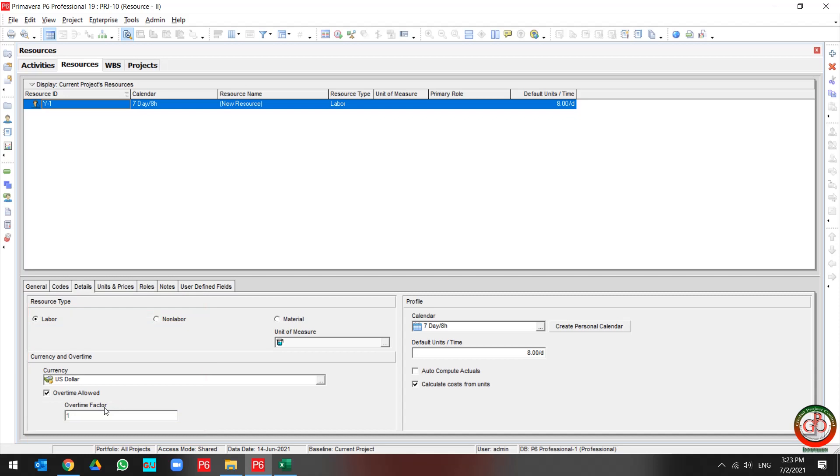For instance, I add 1.5. It means that this budget for overtime charges 50% more.